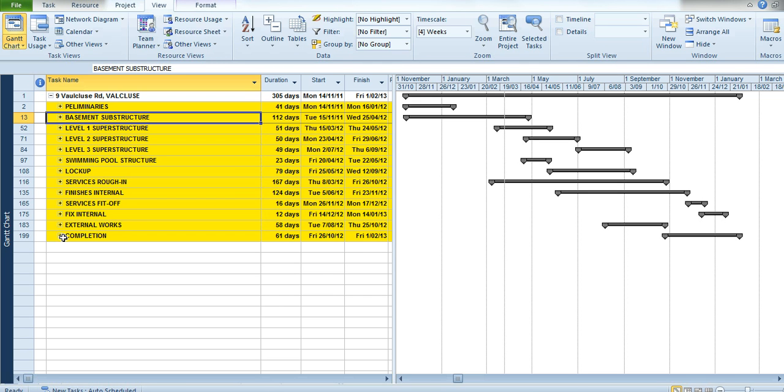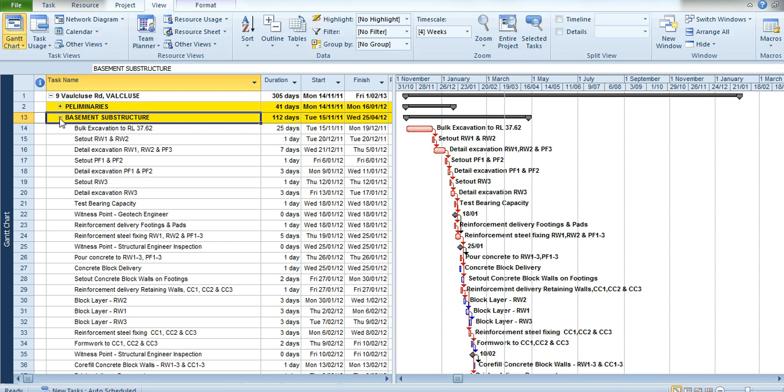This is a brief overview of the project, a snapshot for client viewing, maybe used for tender submissions. Then when it gets down to the nitty-gritty of what you're going to be doing inside each major task, all the tasks that are involved to work the basement substructure area, breaking down each of the items, each of them having a separate contractor that's going to be doing the works.